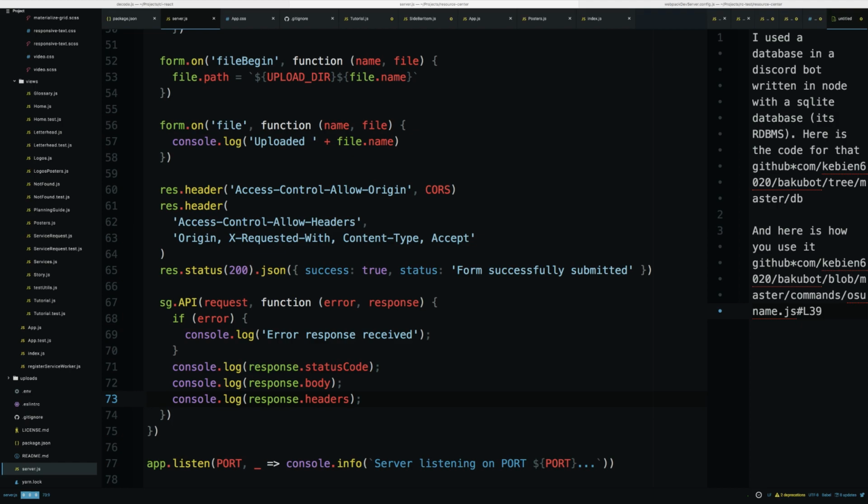I break things down into small tasks, estimate, add them up together, multiply by 3. That's really good advice, actually. It seems like projects always take way longer than you would estimate because of two reasons: one, things not working right the first time, silly mistakes, and then also scope creep.